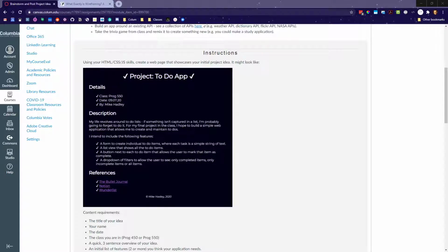And the milestone this week involves 3 planning tasks. So one planning task is wireframing, so that we can start getting an idea of the flow of your application. Another is a Kanban board, which is a popular workflow for organizing tasks. And the third is creating a skeleton application. So you're not actually building all of the logic of your application, but you're kind of mocking out some components and documenting what those components should do.